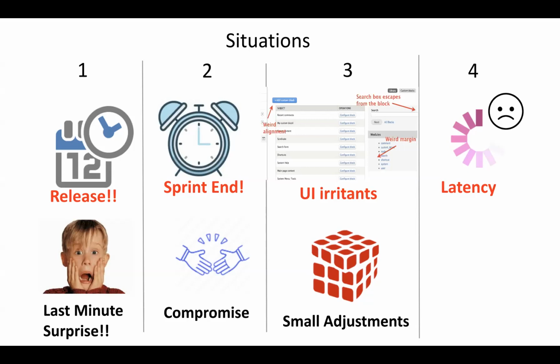So let's say in this latency example, on further investigation, you find that the customer was experiencing this because of some extraordinary load on the system at that time, or there was some kind of data condition that got invoked, which hogged all the CPU or the memory, causing a spike in the system. Now, what are we supposed to do in order to prevent such a scenario in future is a question. So from my experience, this is a perfect time to immediately create a tech story or a non-functional story, whatever you want to call it, with a proper acceptance criteria.